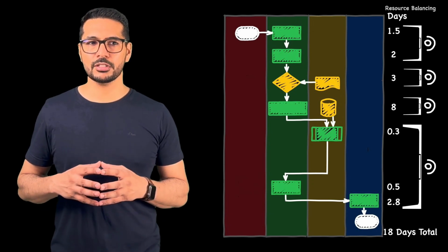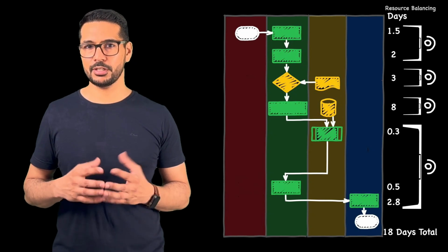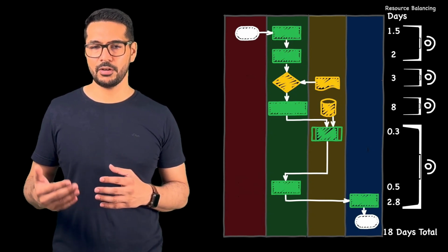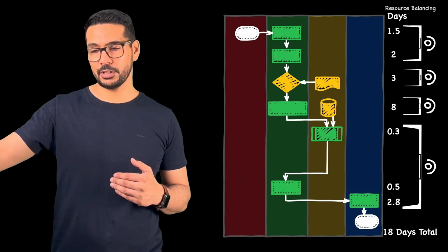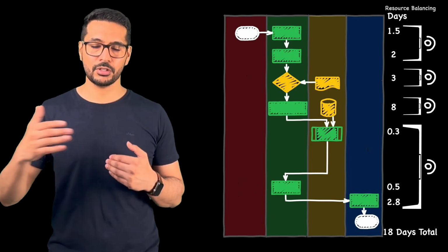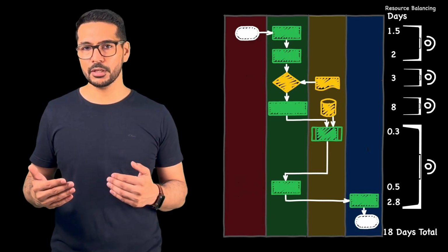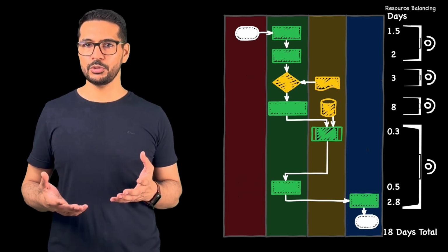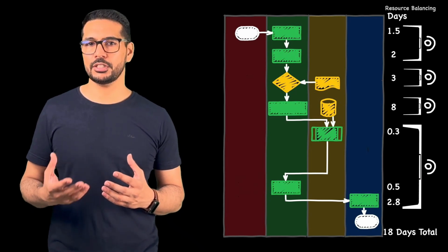And also, it's not that difficult nowadays because of the software or the data entries to calculate when a task was started and when a task is ending. When one entry was done today, the next step is started after 2 days. We know this task is taking 2 days, and there could be some variability from day to day, from task to task, but the average could be used to have a rough estimation of how much each task is taking.